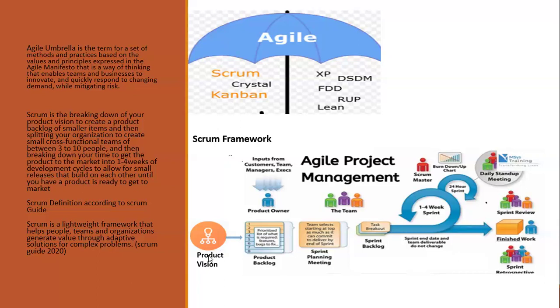After knowing the pain points, you ask all these people how this product they are building is going to be different from what other people have built. Then you ask how it is going to benefit the business, that is the company. How are they going to make ROI, return on investment? So as I said, your product vision needs to contain 5 things. First of all, the product goal, which is the purpose of the product. Then the next one, the target group, which is your user personas, the people that the product is focusing on.